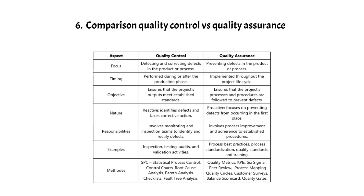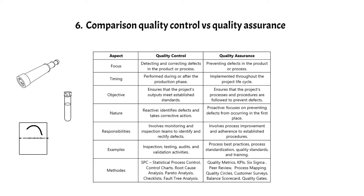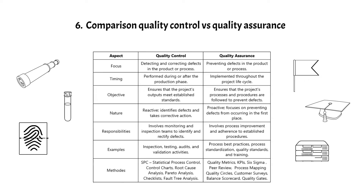Sixth, a comparison of quality control versus quality assurance. Quality control focuses on identifying and correcting defects in the final product or process — it is reactive and takes place during or after production, involving inspection, testing, and audits. Quality assurance, on the other hand, is proactive and concentrates on preventing defects by emphasizing process adherence and continuous improvement throughout the project's lifecycle, and includes process best practices, standardization, and training. Both are critical for ensuring overall quality in projects, but they have distinct roles and objectives. Check the attached table for exemplary methods you can use to set up quality control and quality assurance.